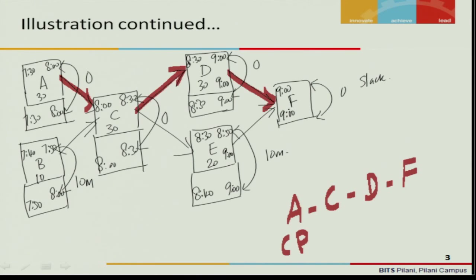On the other hand, if you take the other activity which is not on the critical path, for example, you catching up with your morning chores, instead of starting at 8:30, you start at 8:35, okay, and run for 20 minutes to catch up with your work. 8:35 plus 20 will become 8:55 here.